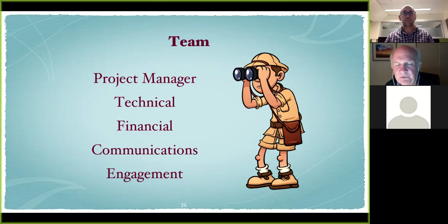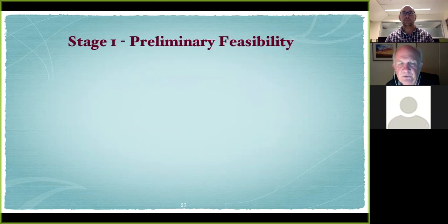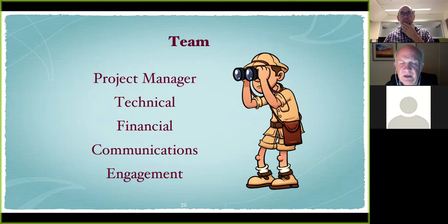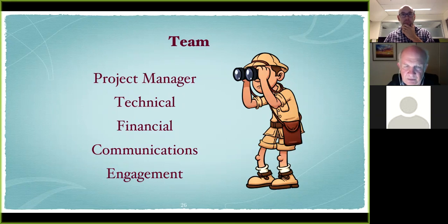What they recommend: if you're going to put a team together, look for a project and you need a project manager — someone skilled in facilitating teams with a bit of technical, financial, and comms background, who keeps an eye on the team, facilities, and process. The technical person can be someone with an electrical or building background to advise and look at quotes and technology. The financial person handles financial modelling and billing. Comms and engagement is also a really important scope of work.